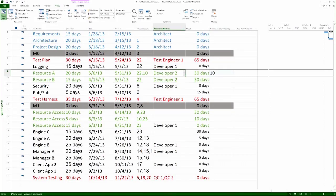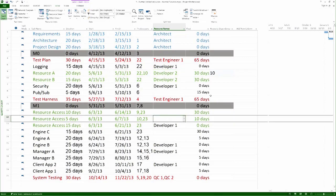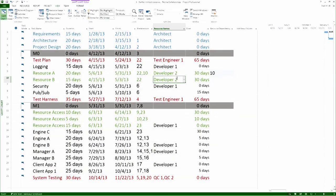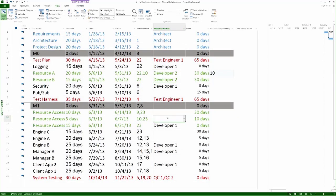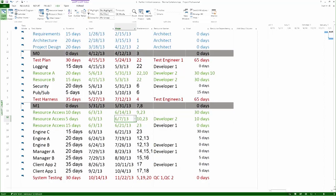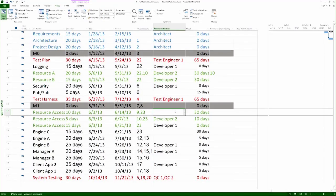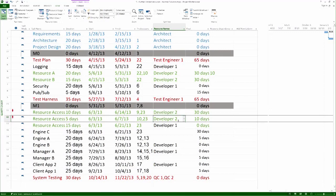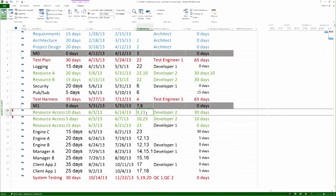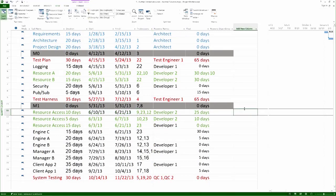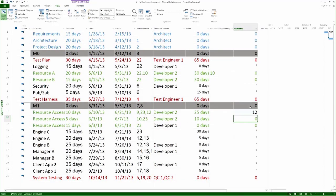Recall also from the book that resource dependencies are dependencies. Fundamentally, the project network is a network of dependencies, not a network of activities. So, now developer 2 is done 5.31. Let's look at around 6.3 for low float activity. It's obviously this one. You can just copy the resource. And then, what else can we do with developer 2? Again, we could say that in the interest of task continuity, we can assign the next green task for developer 2. Of course, if I were to just assign developer 2, again, I would have over-allocation. Since activity 11 has more float than activity 12, I will make activity 11 depend on activity 12. And I would, again, document it on the side.